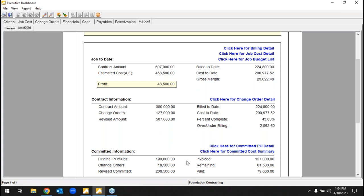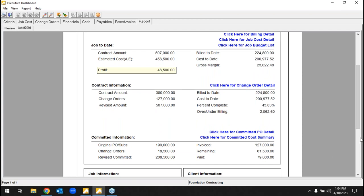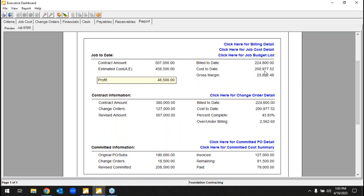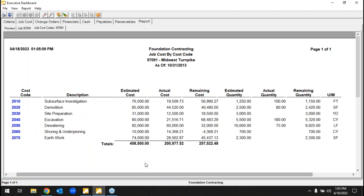From this top-down view, if I click into a project I can see where we're sitting on that job as it progresses or at completion. We see our profit, the contract summary with change orders broken out, and commitments — a high-level view of committed cost on that job, which includes any purchase orders or subcontracts issued. We can also see what we've billed. This job is sitting at about $200,000 in current cost, and clicking into that detail breaks it down by cost codes for that project.